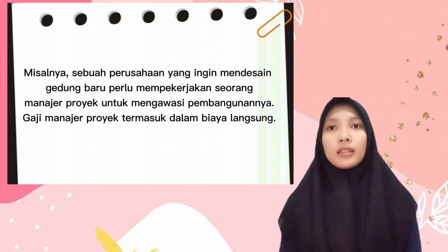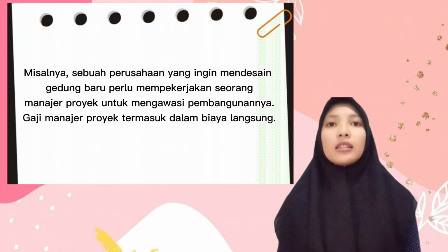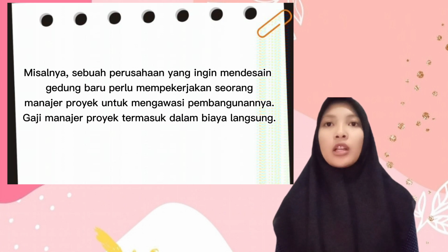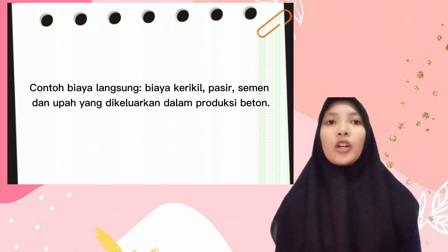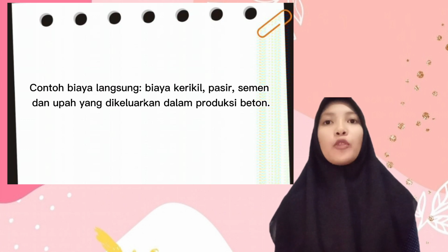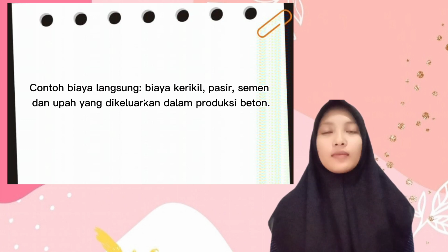For example, a company that wants to design a new building needs to hire a project manager to oversee the construction. The project manager's salary is included in direct costs. Examples of direct costs: the cost of gravel, sand, cement, and wages incurred in the production of concrete.